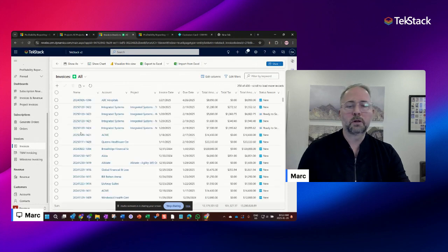The way I did it, we would have actually generated 2 different invoice documents. It doesn't have to be that way. It's all about the timing of generating the invoice. So if you wanted to mix fixed price milestones and time and material milestones on one invoice, not a problem. I just happened to generate the invoice for the milestone before I did the time entry. But anyway, here's a $1,600 invoice. You can see the status of new, and that's ready to go to the customer as well.